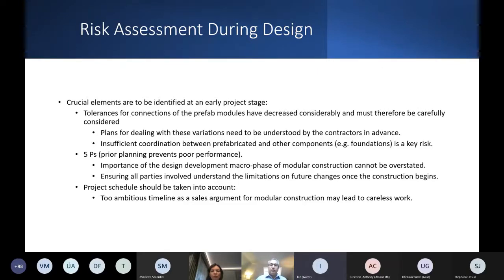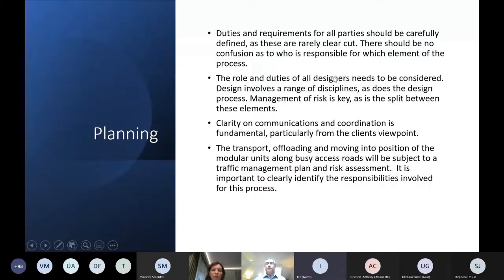One of the things that we will come to later on is that because these things are being made in a serial way, in multiples, a small design problem or a small defect in the design or the manufacturing is going to appear across a lot of these modules all together. And the problem is not going to be limited to one location or one area. It's going to be widespread throughout the entire construction.